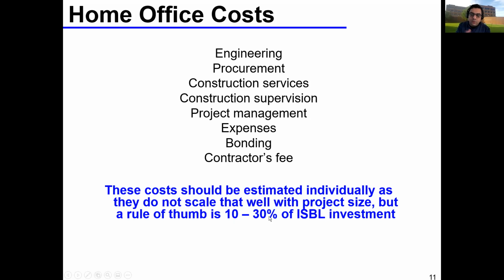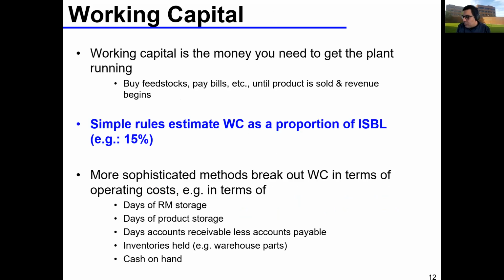However, if you don't know the number, you just assume it's 10% if you don't want to be conservative, or 30% if you want to be very conservative, of your inside battery limit investment. Okay.